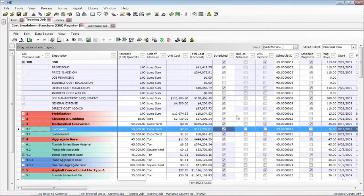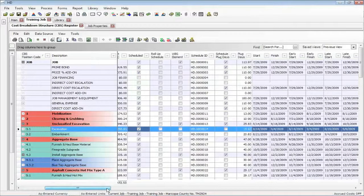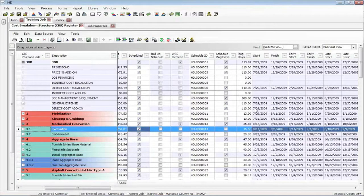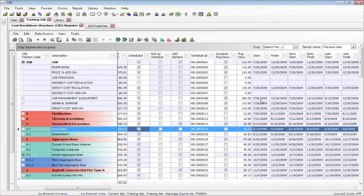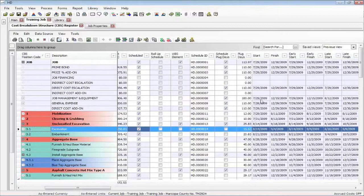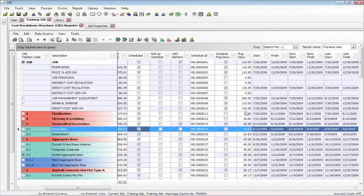These start dates and finish dates that we have here, these will come back from the schedule. In addition to the dates coming back, if you had in fact changed a duration of the cost item activity in Primavera, you will be asked if you want that same duration to update Hard Dollar, yes or no.